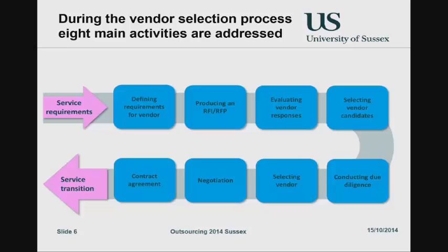In a request for information, typically we'll have quite a few of these, high level, and from that we're going to make a selection of who we think can do the job. That's the broad line about it. Select the vendor candidates. Who are the 2 or 3, maybe 3, who can, all of them could do it, and we're going to make a choice out of these candidates.